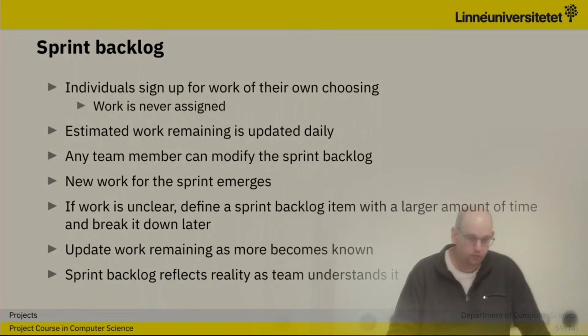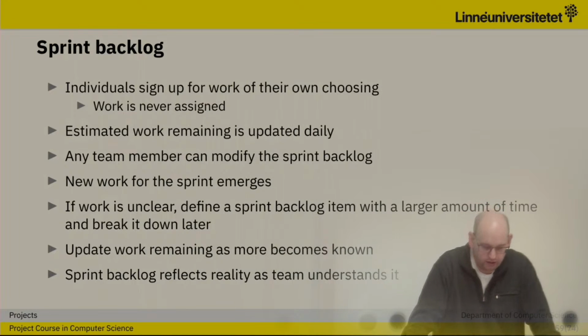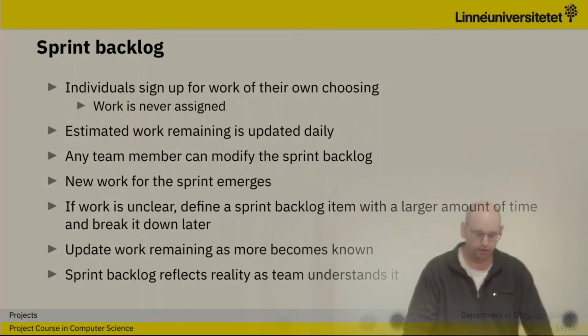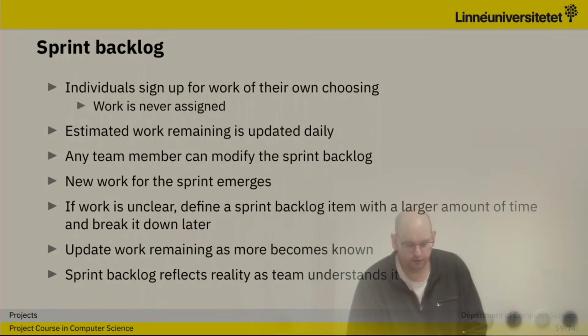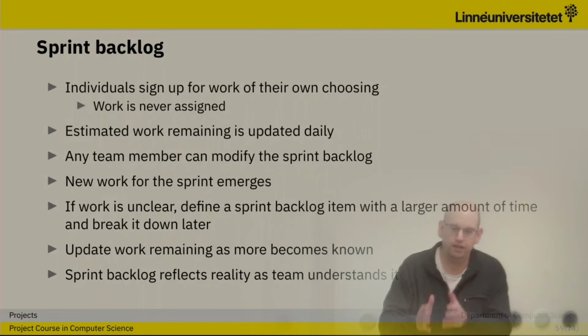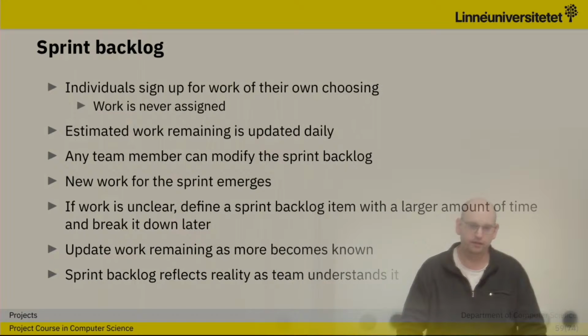When all this is done, we put them in the sprint backlog, and this is important, when we have a set of user stories that we want to do, we let the developers assign them to themselves. So the Scrum Master will never assign work to someone else.